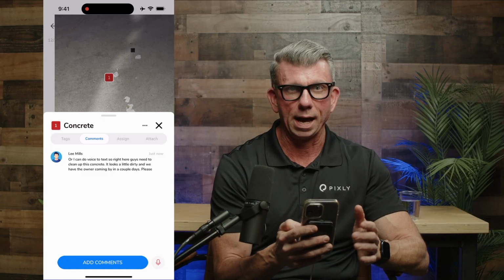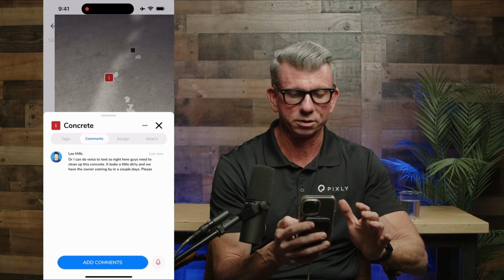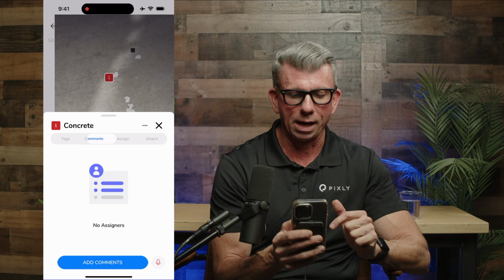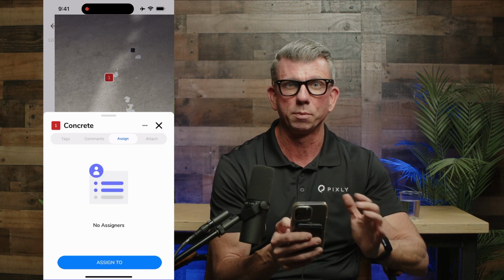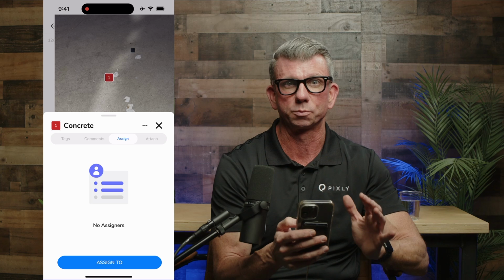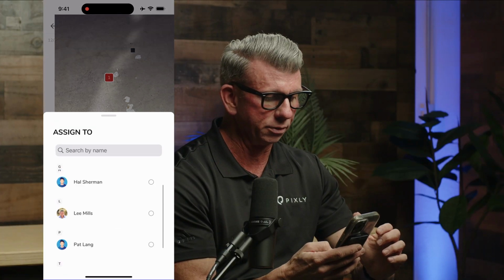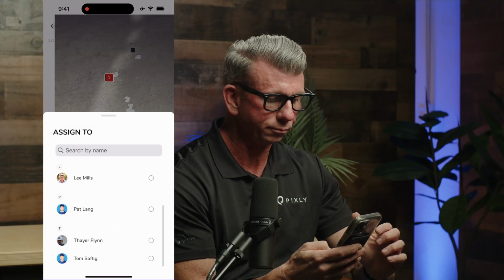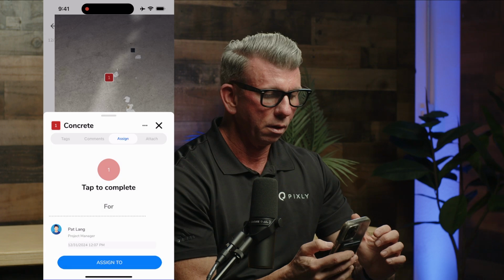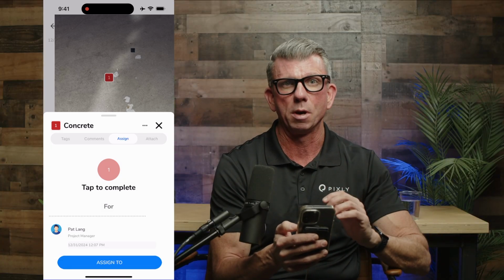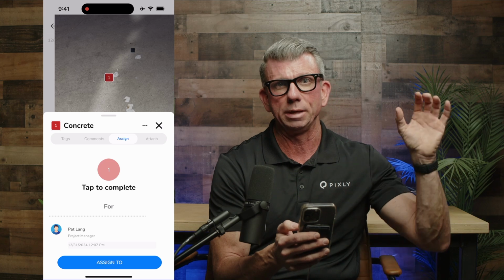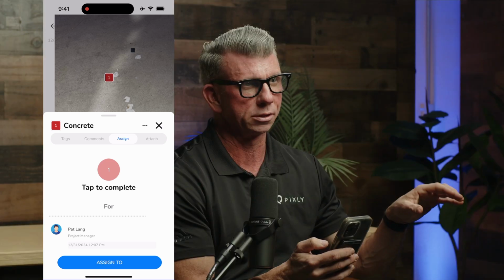Now, I just shared that. That will also be time, date, and location stamped. Now, above and beyond that, I can assign this tag as a task or as a punch list to anybody I want on my team that's been invited to this project. So I'm going to assign this to my guy, Pat Lang. Now, as soon as I do that, Pat gets a notification in the app and via email. He's been assigned that task, and we keep track of it in our punch list task reports.